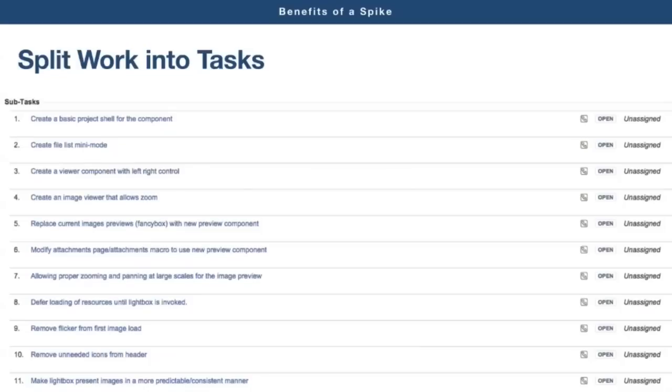It's also important to treat the spike as a proper task. Spike will take time and affect the velocity of the sprint, so create a task for it. Additional benefit is that you'll be able to link the task to the page with the goals of the spike, and the person who actually runs the spike will see the goals there, even if they were not present when the goals were defined. So you literally would be on the same page.